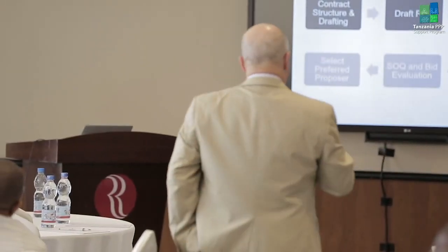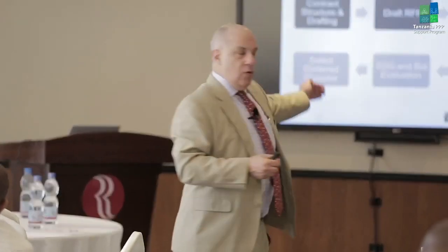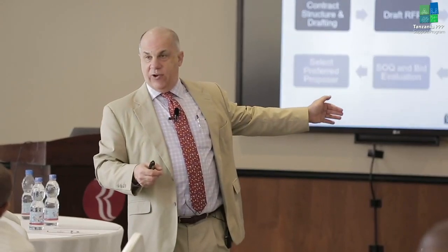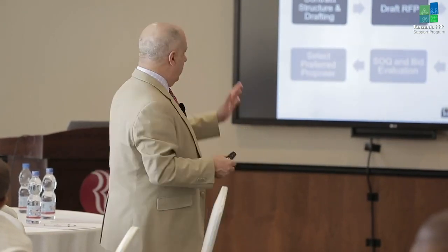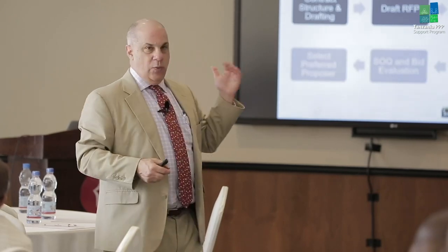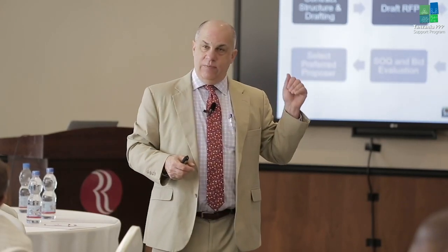A lot of times these projects are ones where the primary criteria is going to be financial, but you still want to have a draft contract. You don't want to negotiate the contract after you pick the bidder. So all we did was eliminate the RFQ stage. We just have an RFP stage.